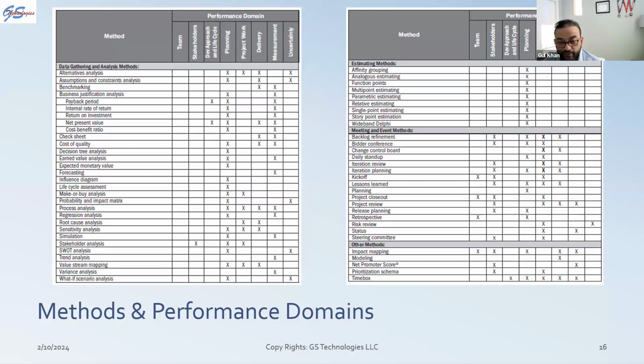to do the requirement gathering, which means that in order to do that, I have to have my project kickoff by 25th of March, so that I can take those from kickoff in March 25th. 2 months from there is going to be May 25th. And then from 2 months, another one, and then add 3 months, and then add 4 weeks. So that basically gives you a time box approach for overall project structure timeline.